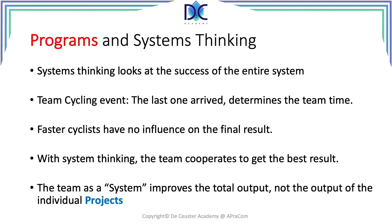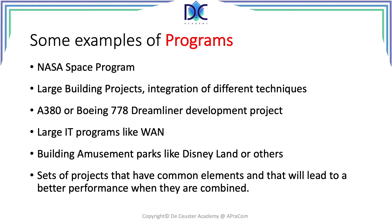The team as a system improves the total output, not the output of individual projects. The program output is the prime concern of the program manager. The program may even include some projects that are not efficient, result in a loss, or perform below standard in other parameters — but they are of key importance for the success of the program as a whole.